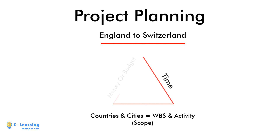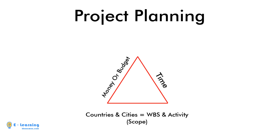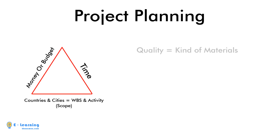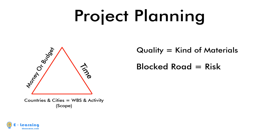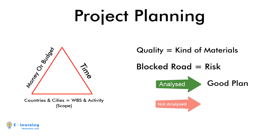The time and money — or what we call budget — also apply in the project. Quality refers to the kind of materials you use in the project. The blocked road is the risk. If you have analyzed these blocked roads before planning, it means you have a good plan. If you have not analyzed them, your plan will face delays.